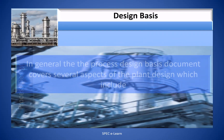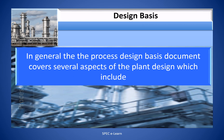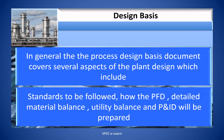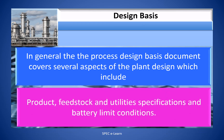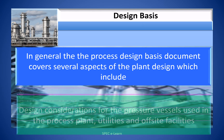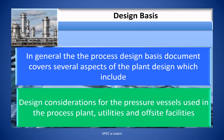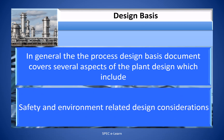In general, the process design basis document covers several aspects of the plant design, which include standards to be followed, how the PFD, detailed material balance, utility balance, and P&ID will be prepared, product, feedstock and utility specifications, and battery limit conditions. Design considerations for the pressure vessels used in the process plant, utilities, and off-site facilities. Safety and environmental related design considerations.